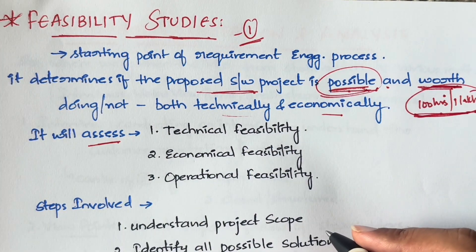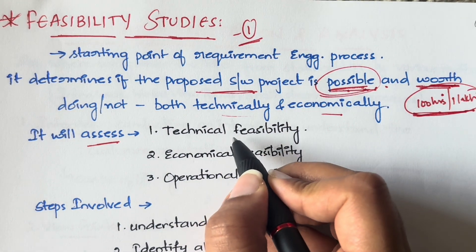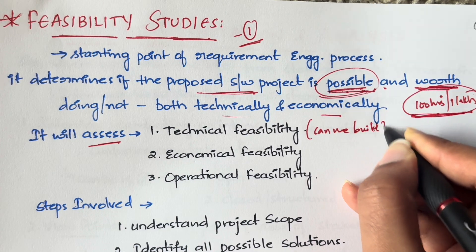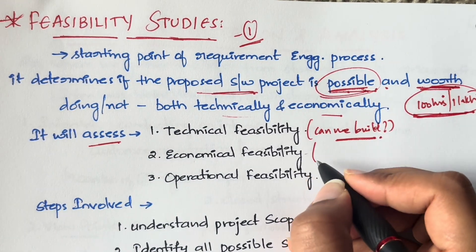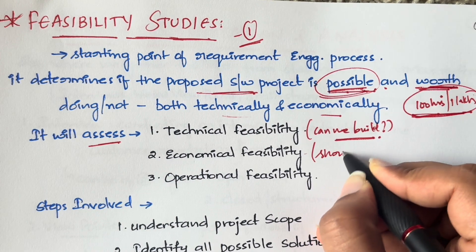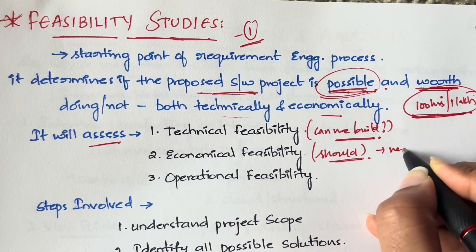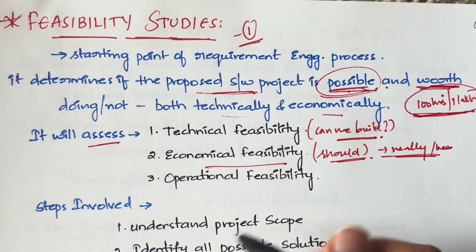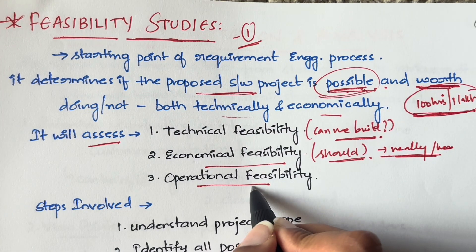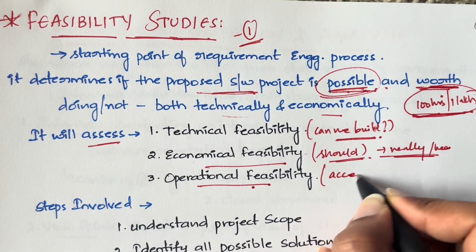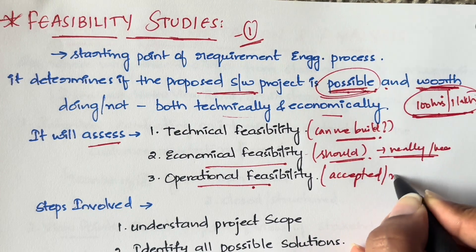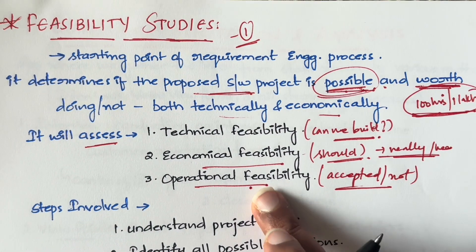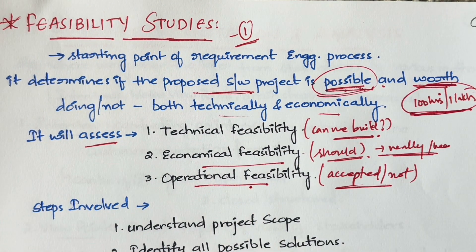The feasibility study assesses different kinds of feasibilities. The first is technical feasibility — can we actually build it? Next is economical feasibility — should we build it, is it worth it, is it really needed? And then there is operational feasibility, which checks whether customers will accept and like the solution.